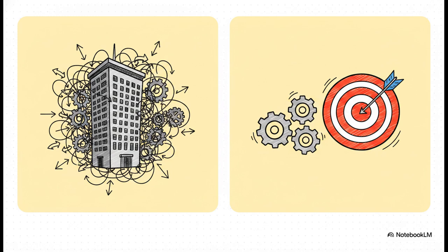Instead, your target needs to be the product family view. This means you map a specific repetitive phase. Think about the MEP, mechanical, electrical, and plumbing fit-out cycle, or maybe just the procurement to delivery cycle for structural steel. By narrowing that scope, the inefficiencies suddenly become glaringly obvious, and actual, actionable, continuous improvement becomes a reality.